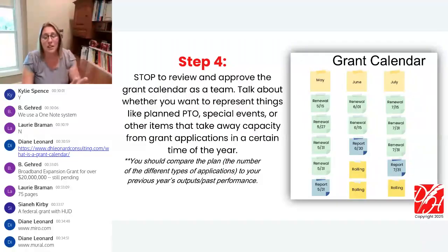The reason we want to make sure everything's here, and by everything, all we've talked about so far are grant applications. What else do I want you to have here before you finalize this plan? I'm going to assume that all of you like to have time away from the office, time away from work, that you're going to take your paid time off. I'm going to assume that there's lots of special events happening in your community, maybe some that are fundraisers for your tribal organization. And so those also happen during the course of the year and might take team capacity away from focusing on grant applications.